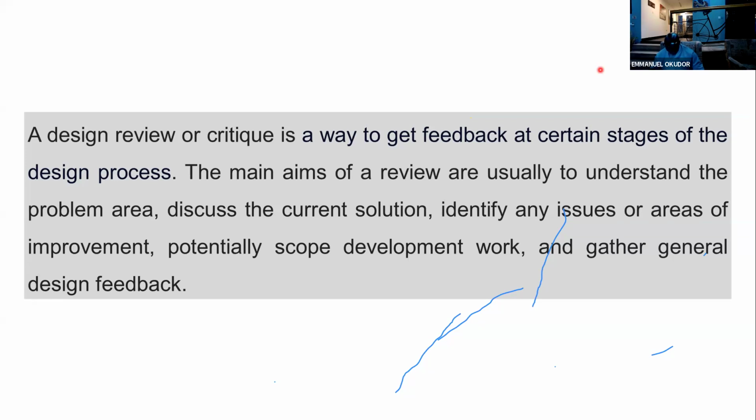This is absolutely wrong because one, it is going to impact significantly on your HAZOP study because the time is not there. The time is actually put together to do HAZOP, not engineering design review. But unfortunately, we find ourselves doing both engineering design review and HAZOP. But the low light is the fact that it's not going to address a whole lot of issues. So for over 24 years, for any time I do a HAZOP, I do a design review.